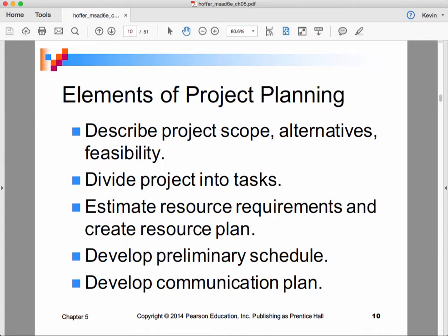We would probably create a release plan, okay, which is a way to decide ahead of time which features you think you're going to develop in what order, even though in an agile kind of project, the team and the product owner are free to commit to whatever user stories and features they want to develop in the next sprint. A release plan would give you kind of a preview.